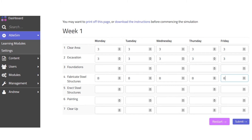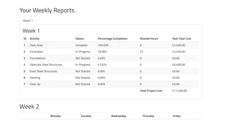Each simulated week of the simulation you enter the resources for each task across five days. You can put in up to 14 resources in the first week. Enter what resources you think need to be on which tasks, click submit, and each week you'll get a report. You can scroll up and down the page to start entering your weekly resource assignments. We can see here that we've finished task 1 and are in progress on tasks 2 and 4.